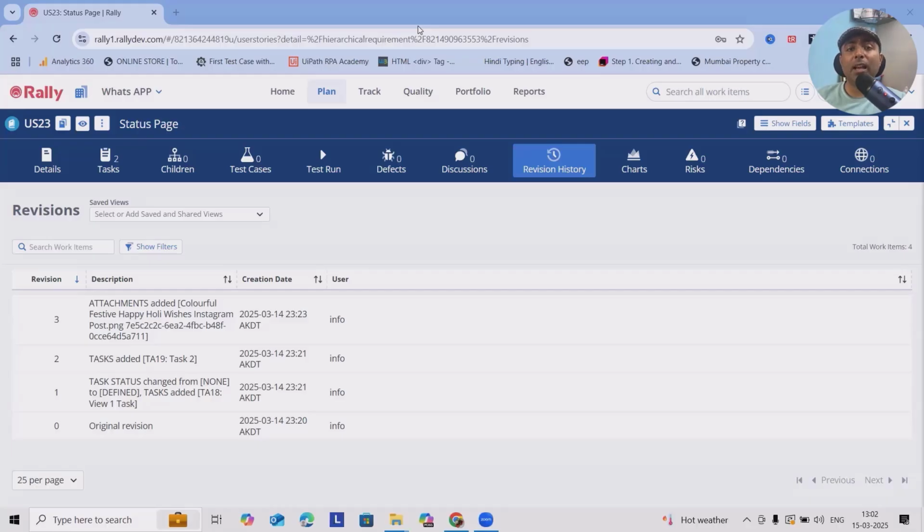Now, why is it important? Wouldn't it be great to spot delays before the end of the sprint? With this chart, we can identify blockers early, adjust the team's velocity, and communicate progress to stakeholders. Now, let's take an example. If your team commits to delivering 20 user stories by mid iteration, and you have only completed 5, the chart highlights this gap, allowing you to reallocate resources or negotiate the scope.